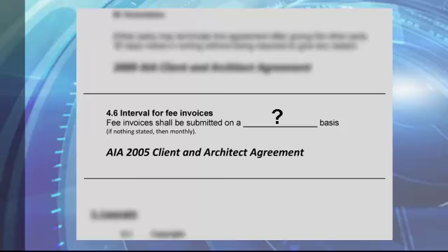If both the architect and the client have obligations to pay staffing and overhead costs on a monthly basis, and typical service fees are also paid on a monthly basis, then it seems both fair and reasonable that the architect should also receive payment on a monthly basis. So avoid agreeing to being paid at the end of a long work stage, as this could be months later, which would ultimately strain your cash flow and jeopardize your financial position.